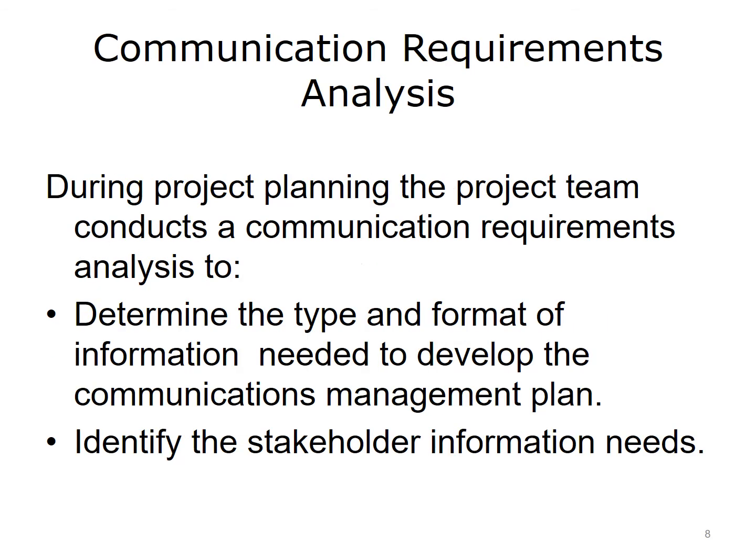During project planning, the project team conducts a communication requirements analysis. This analysis should determine the type and format of information needed to develop the communications management plan and identify the stakeholder information needs. An earlier project planning step in either the project charter or the initial project plan should include a stakeholder register. This register will be a great benefit in your communications requirements analysis.